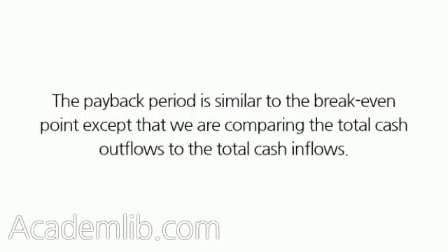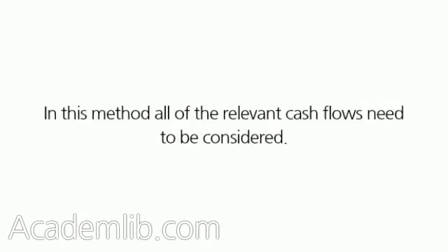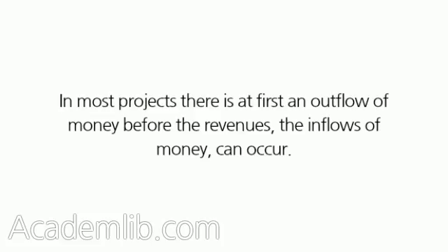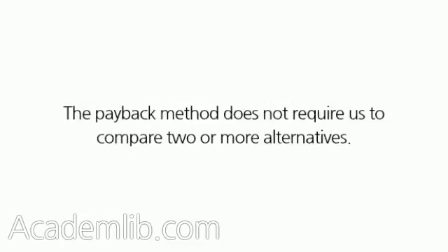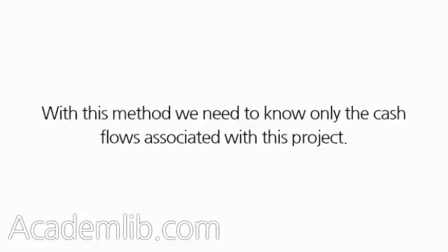The payback period is similar to the break-even point except that we are comparing the total cash outflows to the total cash inflows. In this method, all of the relevant cash flows need to be considered. In most projects there is at first an outflow of money before the revenues, the inflows of money, can occur. The payback period is the amount of time that goes by before the total cash inflows are equal to the total cash outflows. The payback method does not require us to compare two or more alternatives. With this method we need to know only the cash flows associated with this project.